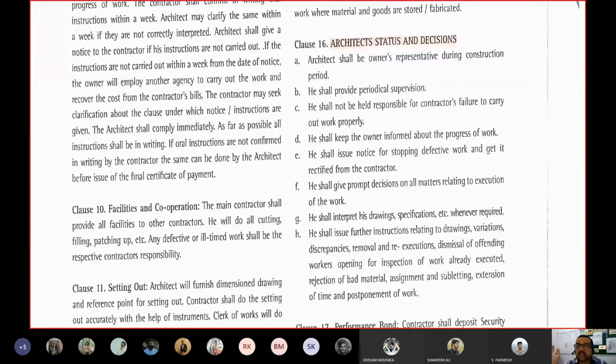For example, he comes and sees that the scaffolding is not made of metal pipes. Instead, they have used bamboo, and it is going to take an excess load, and you have to do construction even before removing the scaffolding of a structure. So he will immediately come and say, okay, remove all the scaffolding, get rid of this wooden one, bring in the one which was promised in the drawing, and re-execute the scaffolding, do the casting later.